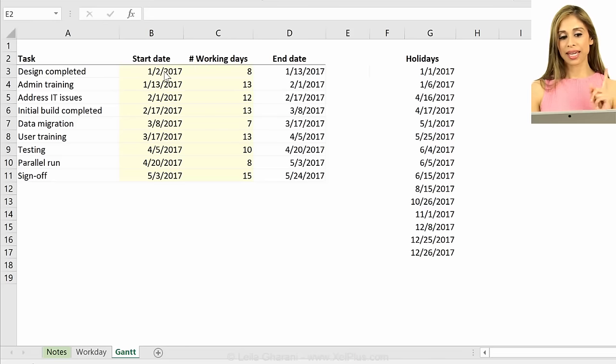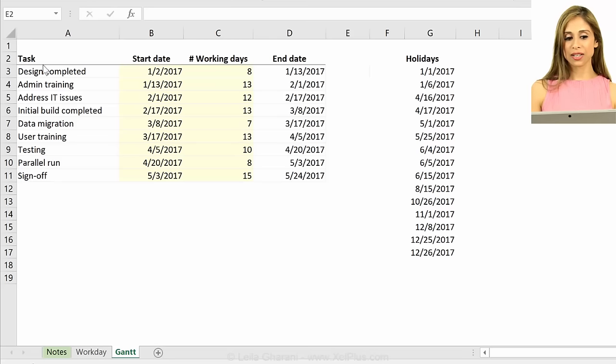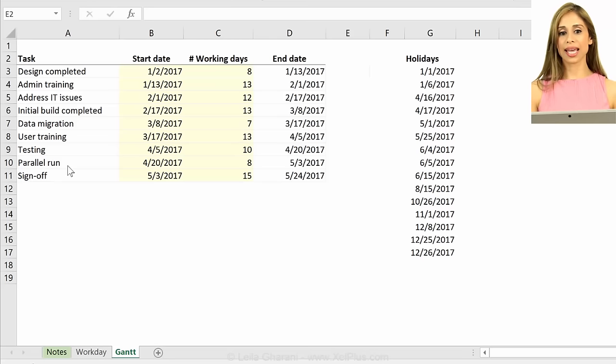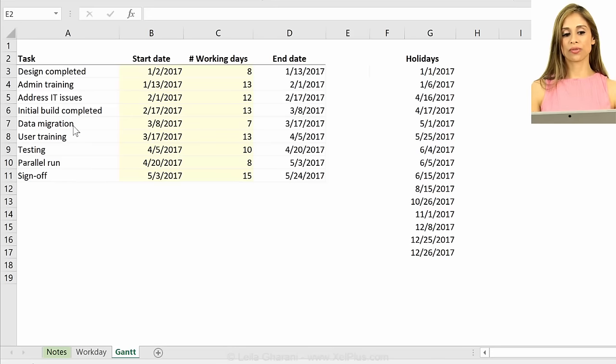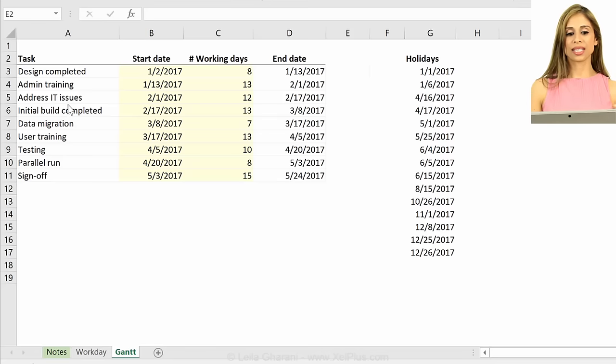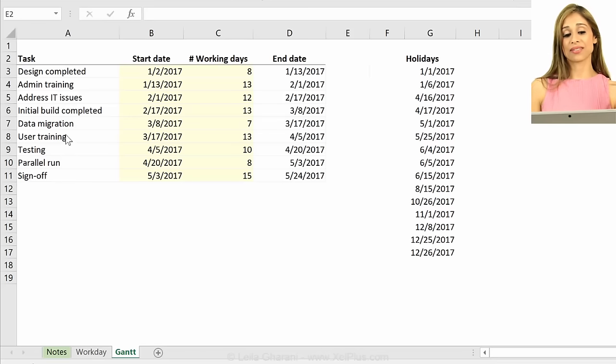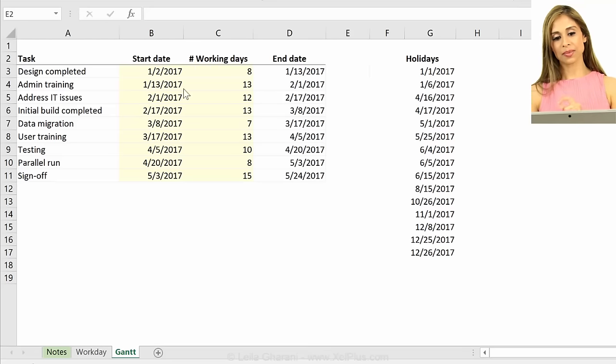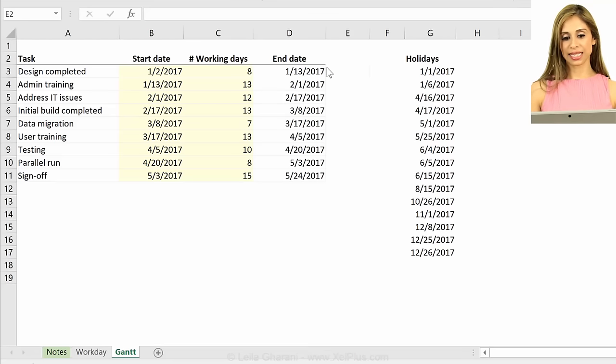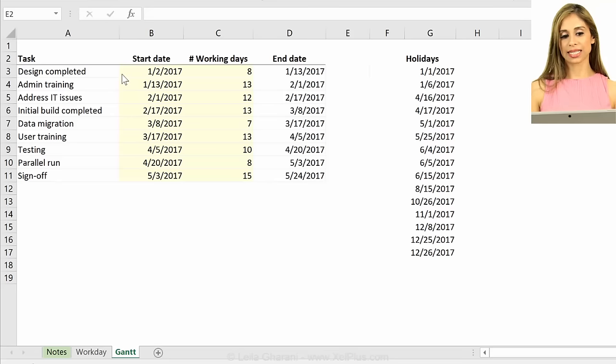So if I use a scatter plot, I need numbers. I cannot put text on the y. I need to put 1, 2, 3, 4. I actually need the numbering of these tasks instead of the text itself. So that's something that I need, and I also need to calculate the full difference between the end date and the start date.